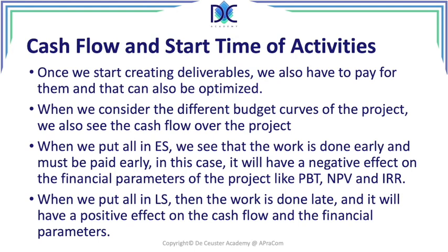But the farther away we are from the early start and the closer to the late start, first of all, we have the cash flow, which is spent later. But on the other hand, the closer we come to late start, the less flexibility we have on the project in means of slack. On the other hand, producing the things later gives us more flexibility in case we have changes later on. We have advantages like damages that will not occur as easily because we have the elements ready and they can be integrated immediately.